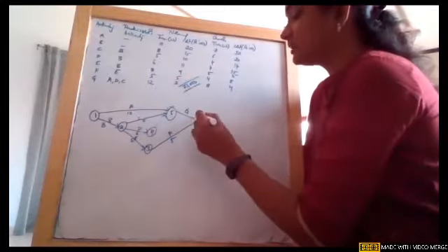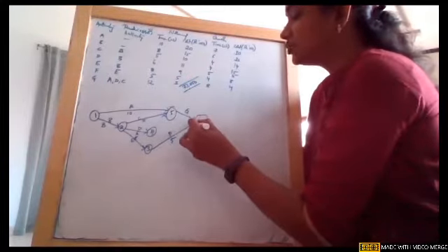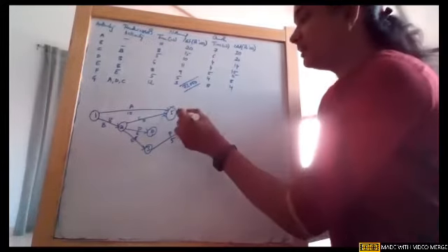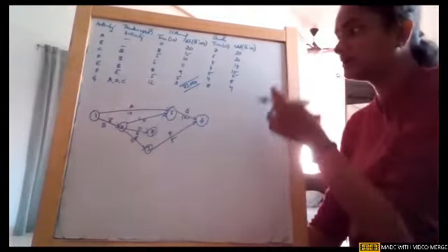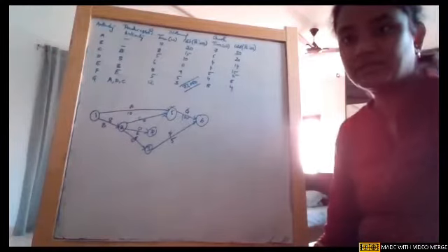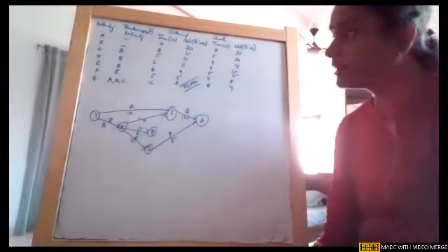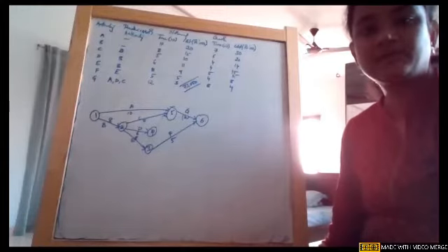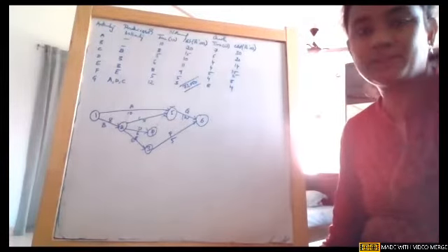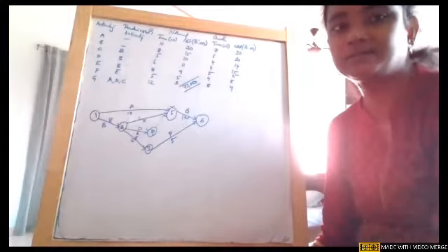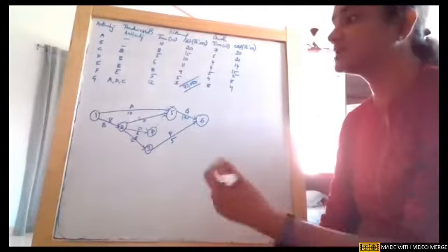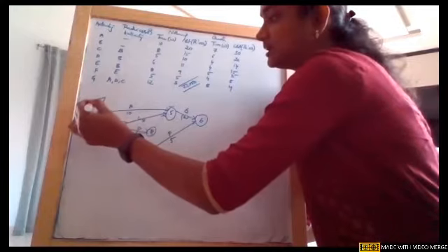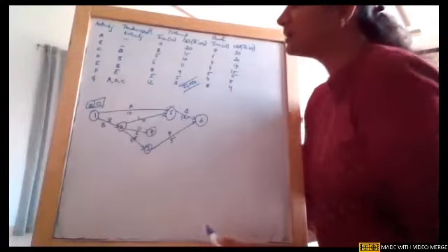After this, there is no network. Obviously, the last two events, we need to attach them and close the network. We can't leave them open. So G is giving rise to 12. So this is our network. We completed our first step of drawing the network. Then we will also apply crashing. But before applying crashing, we need to know the critical path, so we need to first find out the earliest and the latest times for the network. Is constructing a network clear, girls?